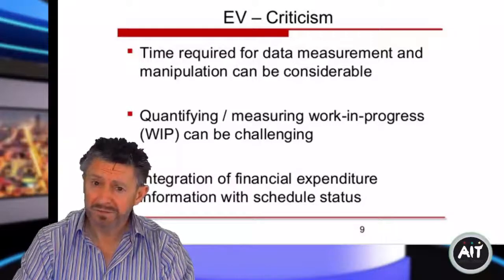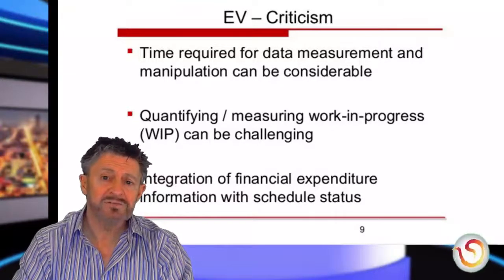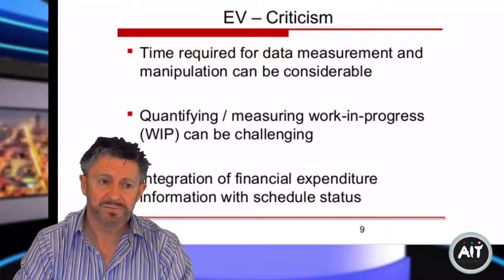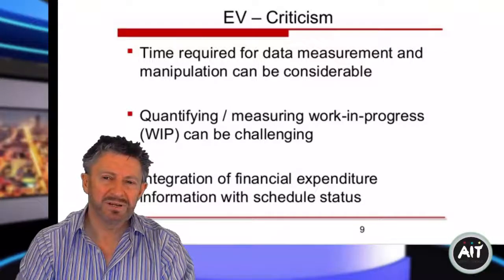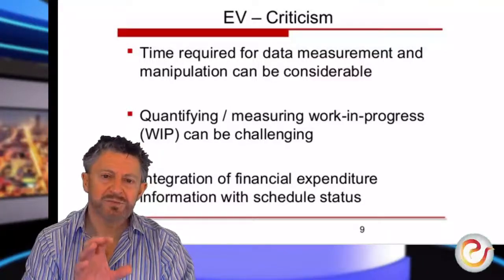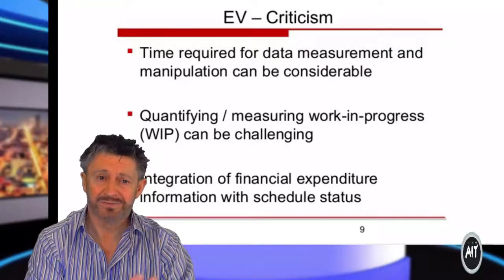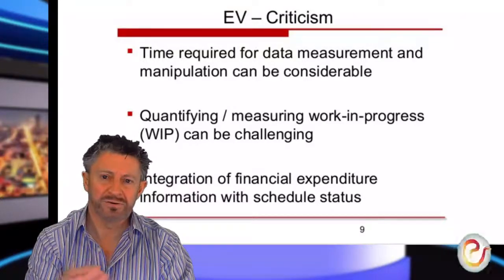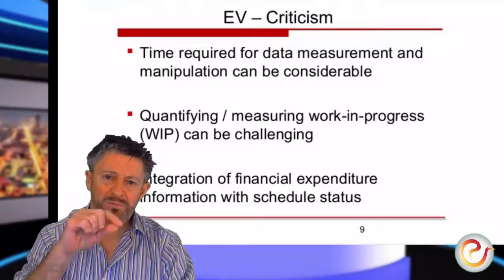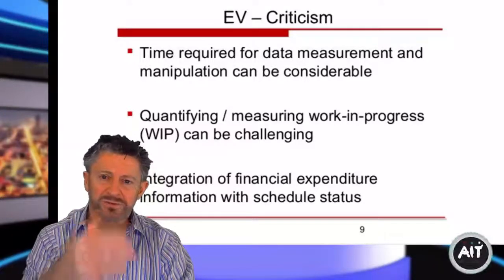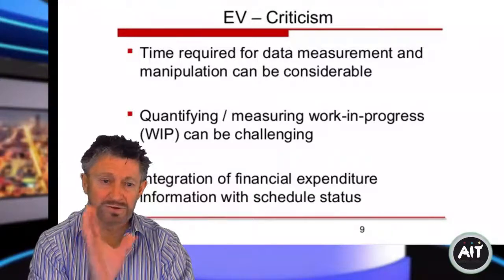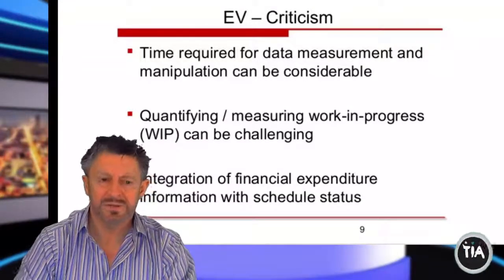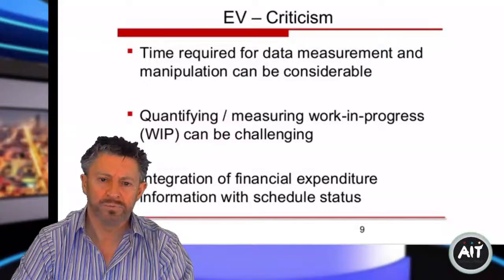It might not be. You might only have 50% of the activity, but Marcus spent 66% of his time on the activity. And this is where it can be a little bit of a challenge, because Mark might have taken it easy in the first week and decided, I better get this work done in the second week and the third week. So Mark's effort might go up dramatically in the third week to make sure he delivers it within the 30 hours or within 3 weeks. So that's one of the ways that you might have an anomaly in terms of quantifying work in progress.